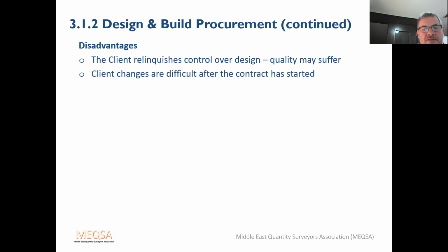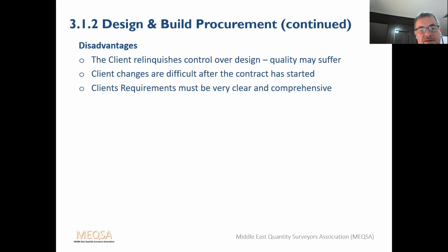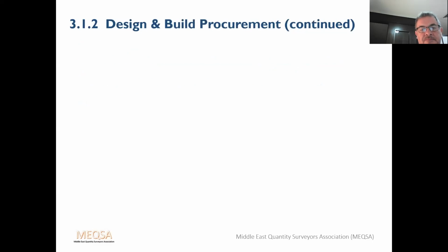Client changes are difficult after the contract is started. They can be very expensive. The client's requirements must be clear and comprehensive. That's key. The client should take guidance from an expert when they're compiling the employer's requirements so they're tied down very clearly. Changes are very expensive post-contract.